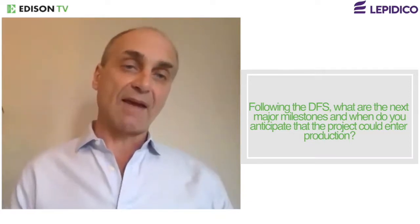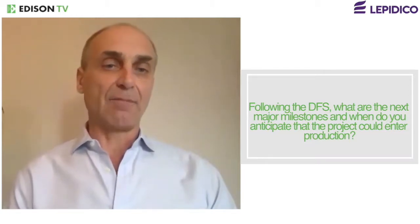To that end, we're very well advanced on the project component within Namibia. That part of the project is also fully permitted, and the ESIA should be complete this July. The ESIA for Abu Dhabi is likely to be completed around year end. And then we envisage that the funding and offtake will be in place by around April or May next year. And we have made some allowance in that timetable for the current pandemic situation. So if we can make a final investment decision around April, May next year, we'll then be looking at commissioning the mine and the concentrator in Namibia in the second half of 2022, and commencing chemical production in Abu Dhabi in the first half of 2023.